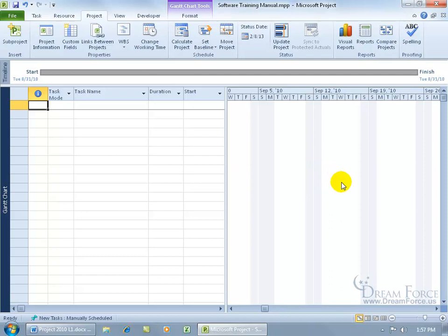Now, don't panic if you don't assign the project calendar to the Gantt chart. It just visually, if it's not assigned, you won't be able to see it, but it'll still prevent you from working on those days that you set aside as non-working days or exception days like Labor Day. It won't show you the gray lines, but it will actually move the task over so it doesn't work on that day, which might be confusing.